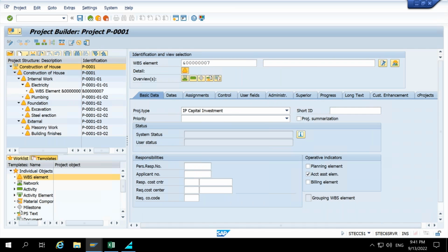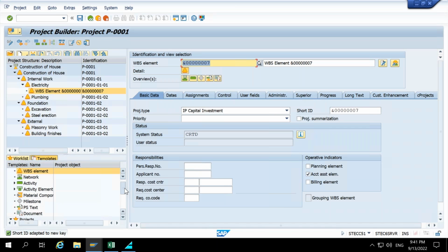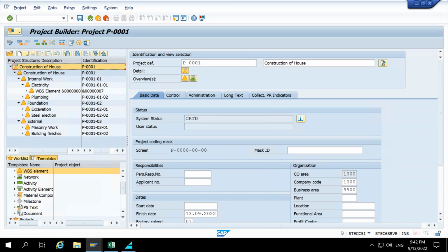Let's press enter. But the only difference here is it's picking a different number. Okay, it's picking a temporary number. So you have to give that number manually. Only using this hierarchy way, the system will generate the automated number. But if you are using this way, the template one, or let's say this overview option, in that case you need to provide the number manually. So the first, one click, is better here, right? Instead of template. It depends, it's case to case.